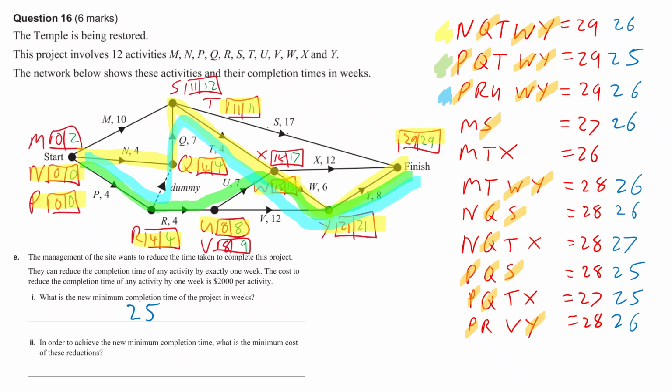If I look at this, I've got just the one 27 left. I think I'll crash N. So let's crash N, because that's pretty good actually. If I crash N, N, N, I'll get to, remember I said 25 is the maximum. 25, where else is N?